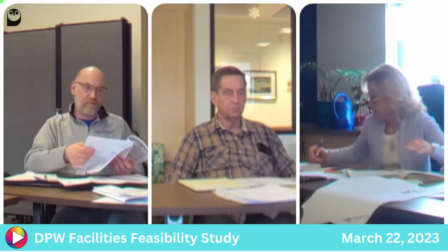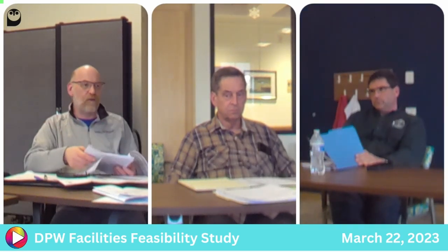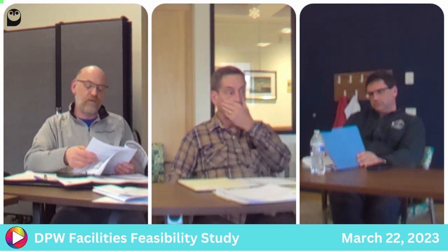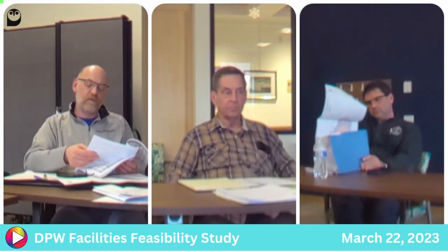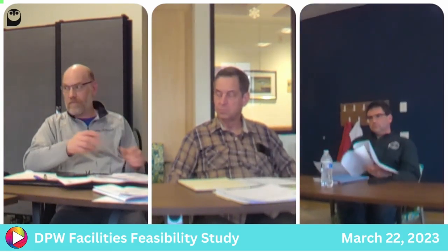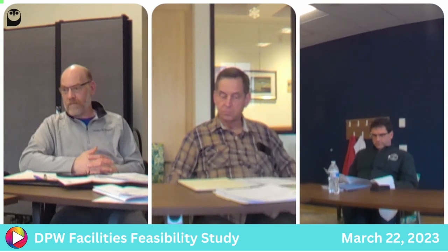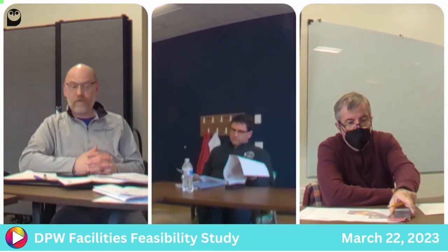This is sort of assuming we don't end up having to do special foundations or something, which is usually additional engineering services. So it's about $2.5 million in that range. And at our last meeting, you suggested that some geotech work would be appropriate. Correct. Right.